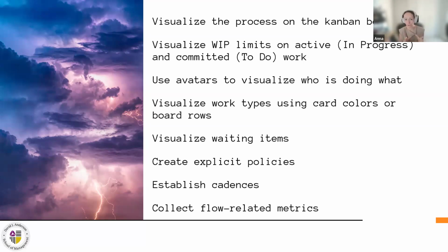So if you don't know how it looks, create one big fat in progress column and then try to track what's happening when the work is in this analysis in progress. And maybe you will figure out that there are some specific steps taken to do this analysis, to collect these requirements. Maybe not. Maybe your process will end up with a big fat in progress for analysis, and it's also fine. Okay, don't over design your systems if not necessary.